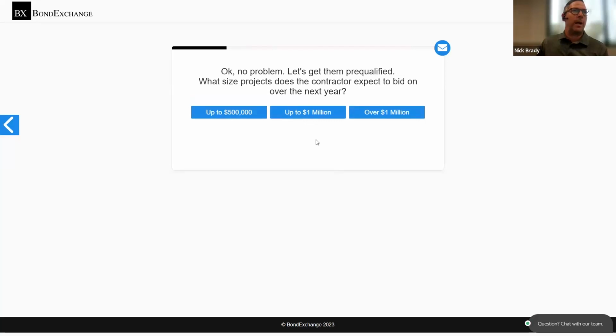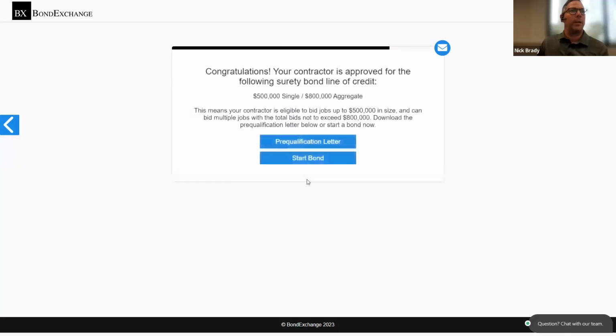Let's get them pre-qualified. So we're going to ask what limits they're looking for. In this case, we'll use our quick program. So at this point in time, it's running a credit report on the applicant to determine if they're approved. In this case, congratulations, your contractor is approved for the following surety bond line of credit. So the first limit here, it's a $500,000 single limit, meaning that she's pre-qualified for any one given project up to $500,000, and an $800,000 aggregate limit, meaning at any one time she can have multiple bonds, not to exceed $800,000 in total.